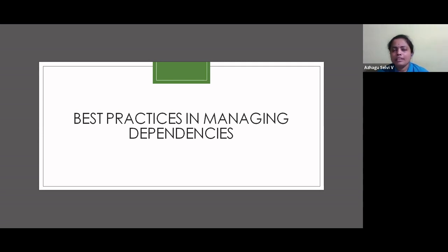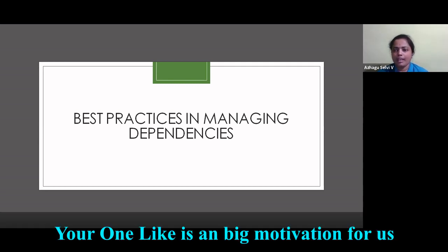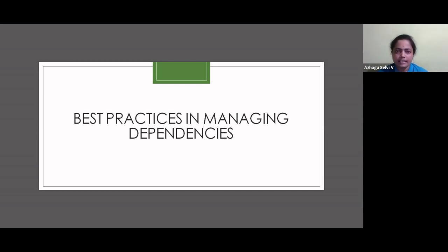Now, this is a dependency, and I have identified it. So here the action owner is, as a Scrum Master, I can own this action item. The reason being, I need to connect with the design team and tell them that this is the next refinement meeting we have, and ask whether they can give this as a priority item so that the team will be able to estimate it, because the functionality is clear to the team.